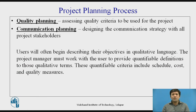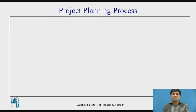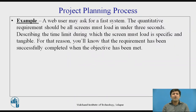Users often describe their objectives in qualitative language. The project manager must work with the user to provide quantifiable definitions for those qualitative terms. Quantifiable criteria include schedule, cost, and quality measures. For example, a web user may ask for a fast system — the quantitative requirement should be that all screens must load in under 3 seconds. Describing a specific time limit makes the requirement tangible, so you will know when the objective has been successfully met.